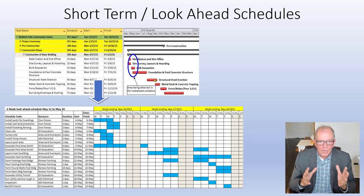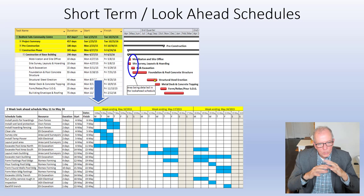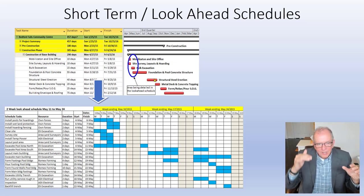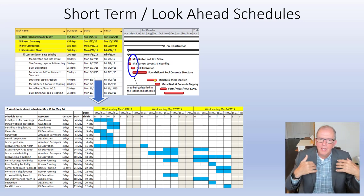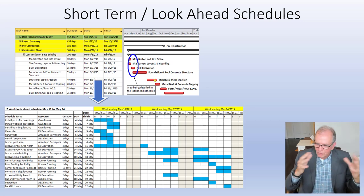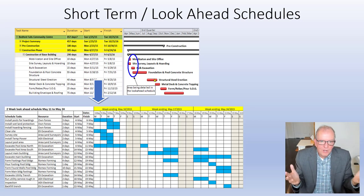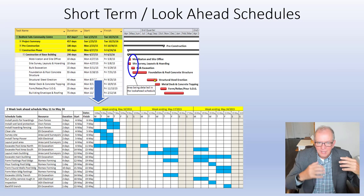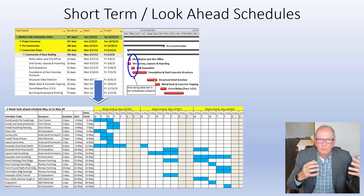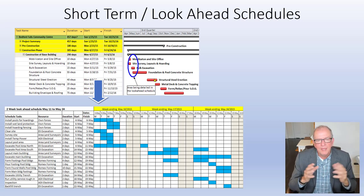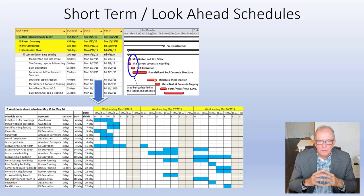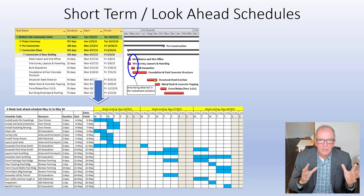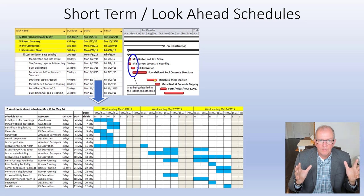We should baseline the schedule and detail it out much more than a bid schedule. We should involve the major trades and supply chain connections in that development of the baseline schedule.